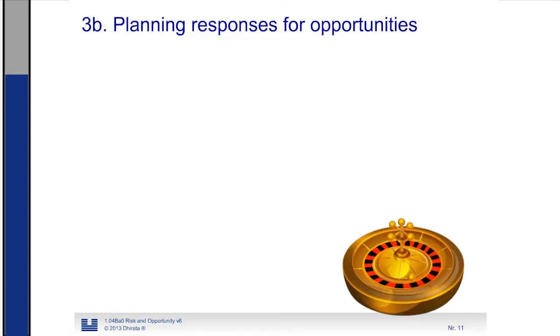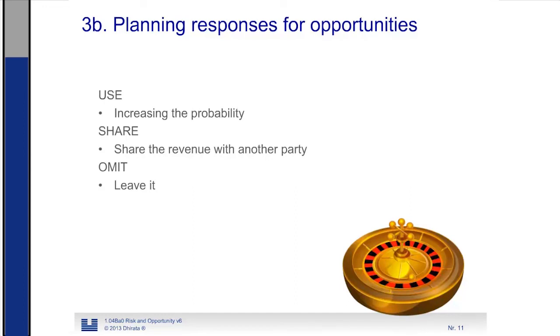The same can be done with opportunities. So we have three main groups. First we have use the opportunity. There we are going to try to increase the probability that the fortunate event actually will happen. If we would share the opportunity with other parties, we can persuade them to perform favorable actions that would help us to share this opportunity. Let's say you could have a kind of bonus system or a kind of incentive system for suppliers. And if this incentive system is there for suppliers, you can, for example, share savings. It would stimulate the supplier to do the work more efficient. And of course, the same like accepting, we could omit the opportunity. And there we leave it as it is.